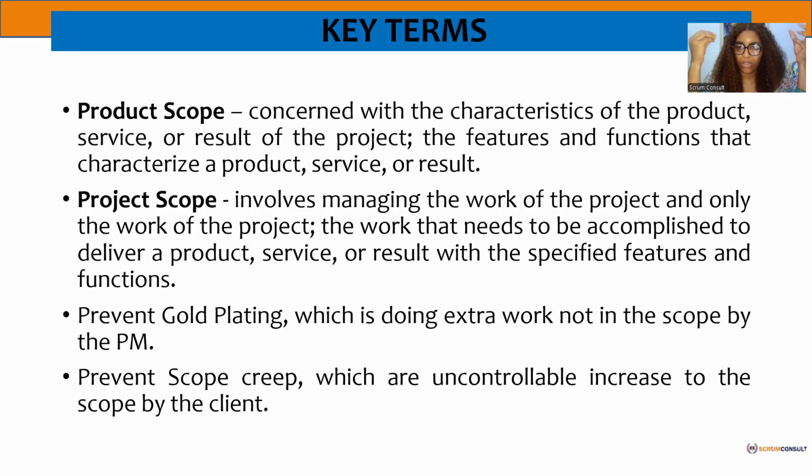And also, one of the things that could affect you as a project manager is gold plating. And gold plating is done by the team. A customer needed this phone with this color, and you finished it, and your developers are still here polishing to make it darker than what the customer needed. Doing extra work that is not in the scope.